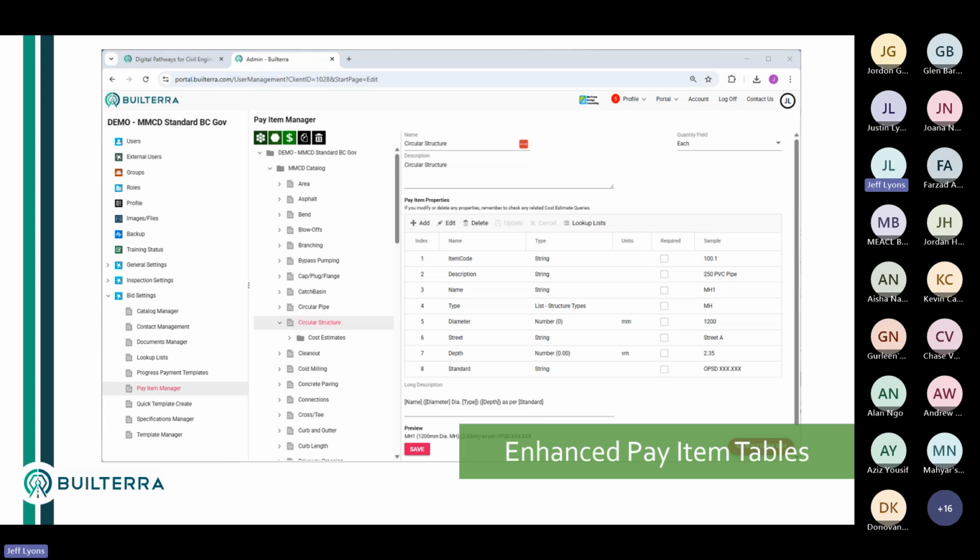And this allows us to scrape data from Civil 3D and do better cost estimating. So, you know, the cost of a pipe at depth would be different. Say a shallow depth is obviously cheaper than something deeper. So I'll show you an example of that.